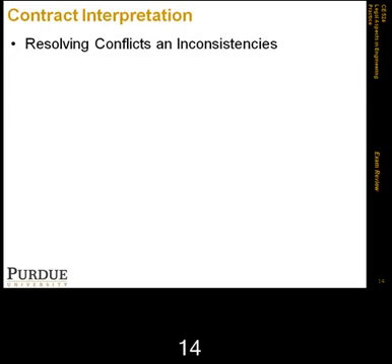They try to reconcile provisions of those contracts with each other, and then they follow some rules, such as giving precedence to operative clauses over those that give general background. Handwritten is sometimes preferred over printed.